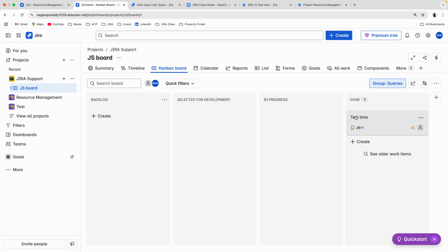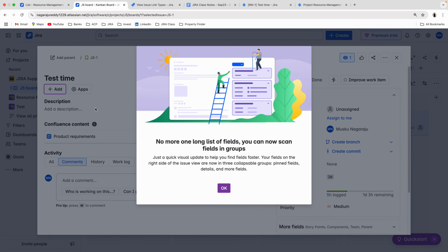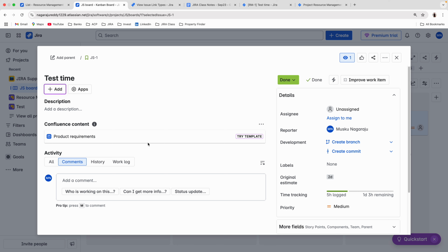Whenever you create a ticket, this ticket may have some relation with other tickets. Relation may be anything, like relates to, blocks, tested by or something. So duplicates, some same tickets is created as a duplicate, so we link with the duplicate. So in Jira, one ticket we can link with another ticket with some relation.